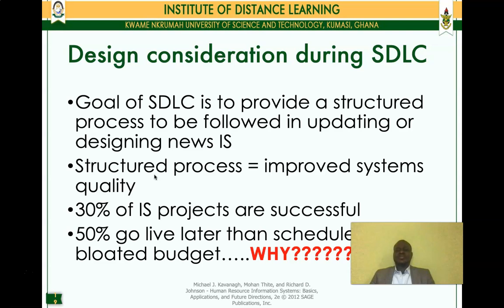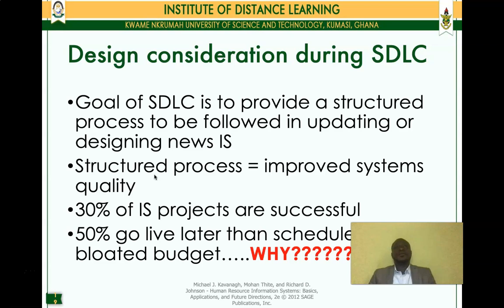Statistics show that about 30% of information systems projects are successful. The question is, where does the 70% go? Something is probably accounting for the failure of that 70%. Again, 50% of the 30% that are successful also go live later than the scheduled dates, usually with bloated budgets. One of the most important reasons we need to consider systems scope is to prevent scope creep.